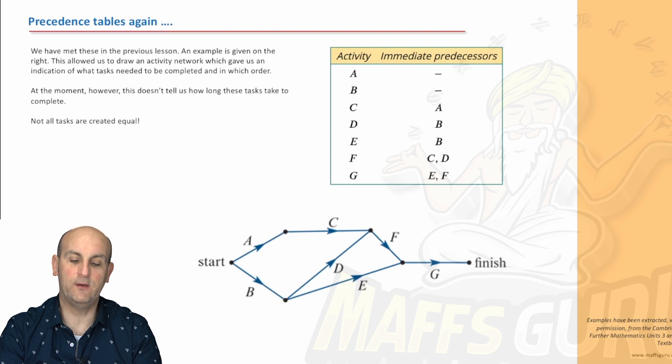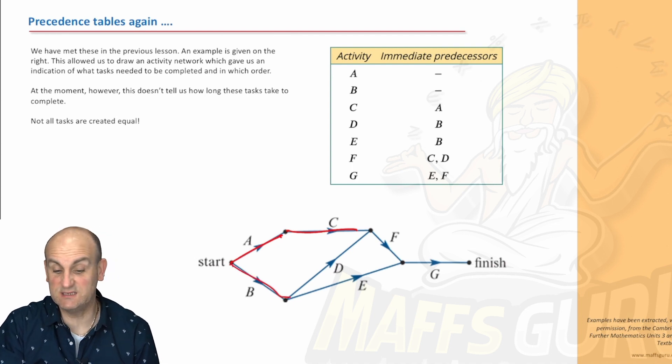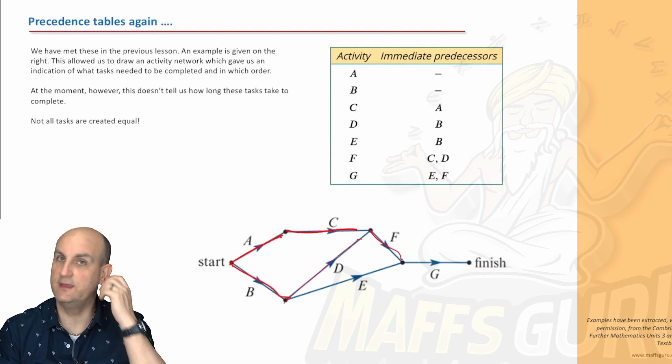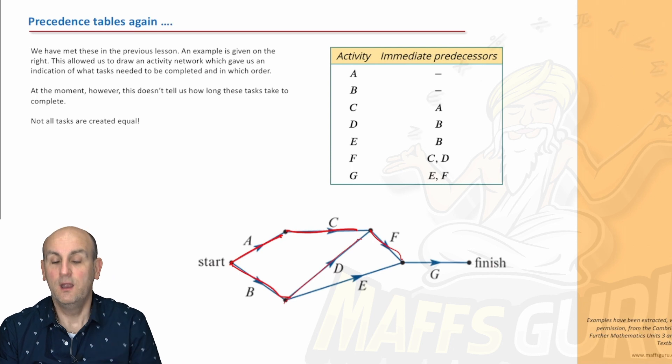Precedence tables again. In this situation here, there is a precedence table. It's a list of things to do. But it's a fairly pointless idea at this moment because it tells me that I can't start C until A is finished. I can do A and B at the same time. F can only start when C and D are finished, which is pretty much what the precedence table is telling me.